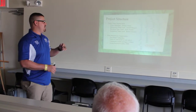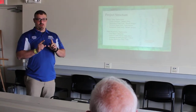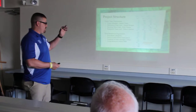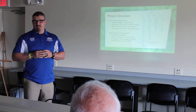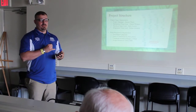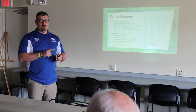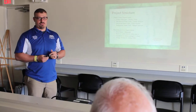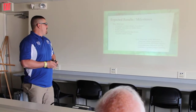In some places, in order to try to get it down to a 10-hour or so work package, we broke those down all the way to the 6th level. Just some were that difficult. Once we had that work breakdown structure completed, we were able to go in and try to assign resources, both human resources and parts and equipment, machining time, assign those resources based on work breakdown structure, and that's where the project software really helped with that.